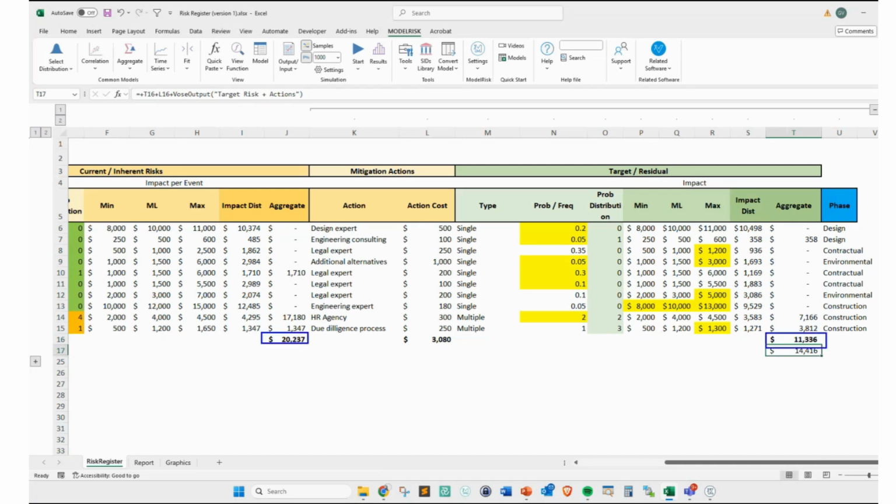That's totally obvious because you have a reduced probability or impact, but you have to take into consideration the real money that you're going to spend, because this is money that could happen, and this is money that could happen, but this one here, the 3 million, is money that will happen, right? So the main idea is that with this money that will happen, you will have to reduce heavily, hopefully, your P80 from the 25 million that we have to any number that we're going to see now.